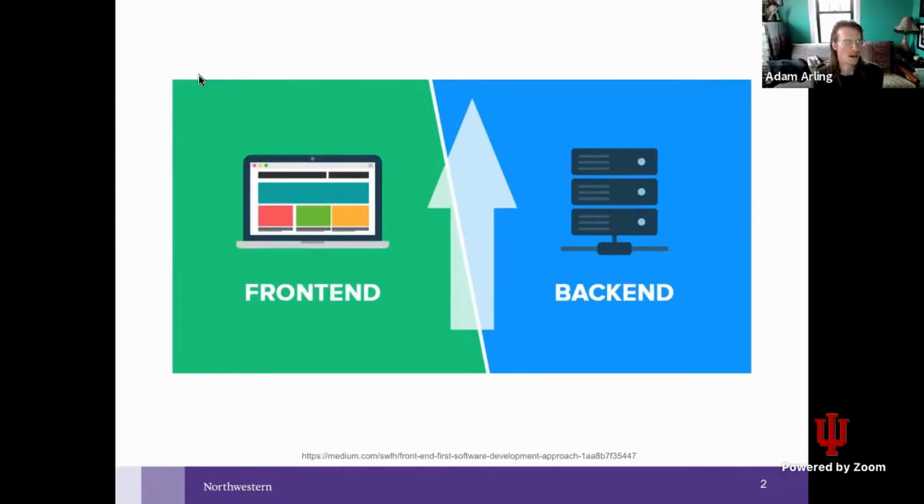So when our team approaches a new application feature or issue to work on, we see the work from different perspectives. And I think the workflow that we're evolving towards is parallel development and embracing our team's different perspectives. So how can we break down an issue or feature into parts that can be built at the same time?